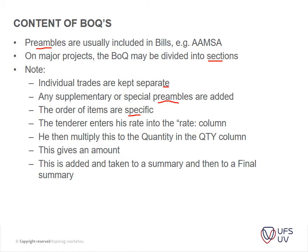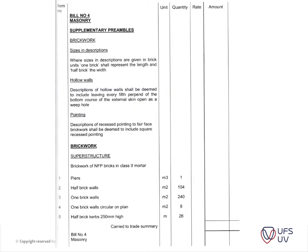The tenderer enters his rate into the rate column, multiplies the quantity in the quantity column by this rate, and it gives an amount on the right-hand side. This is added and taken to the final summary. I'll show you now on the layout. All of your bills will have this same layout with your item number, description, unit, quantity, rate, and amount — and your supplementary preambles for anything you want to add.